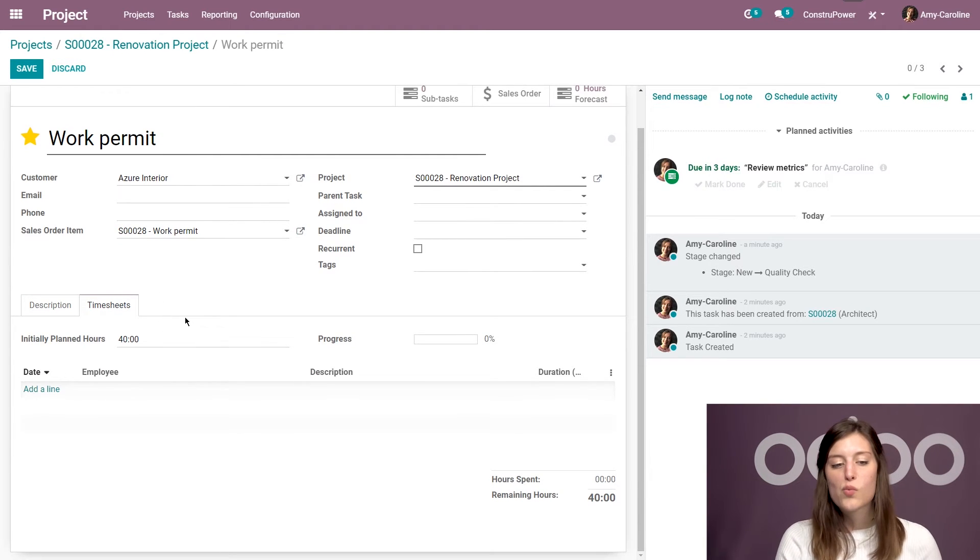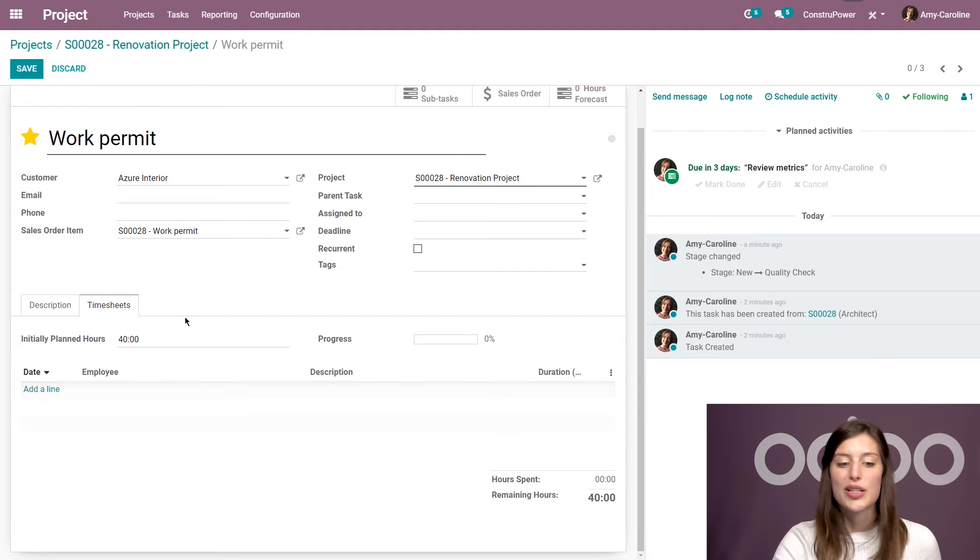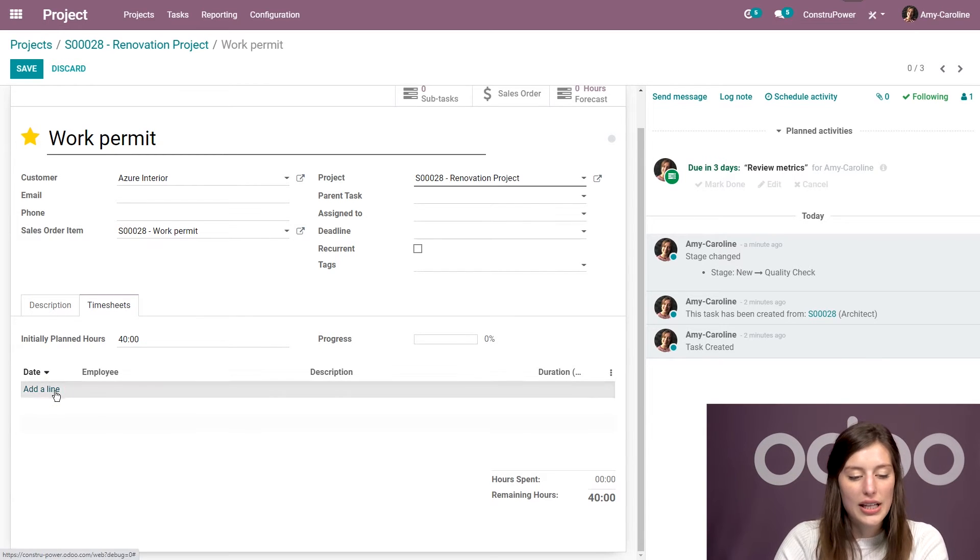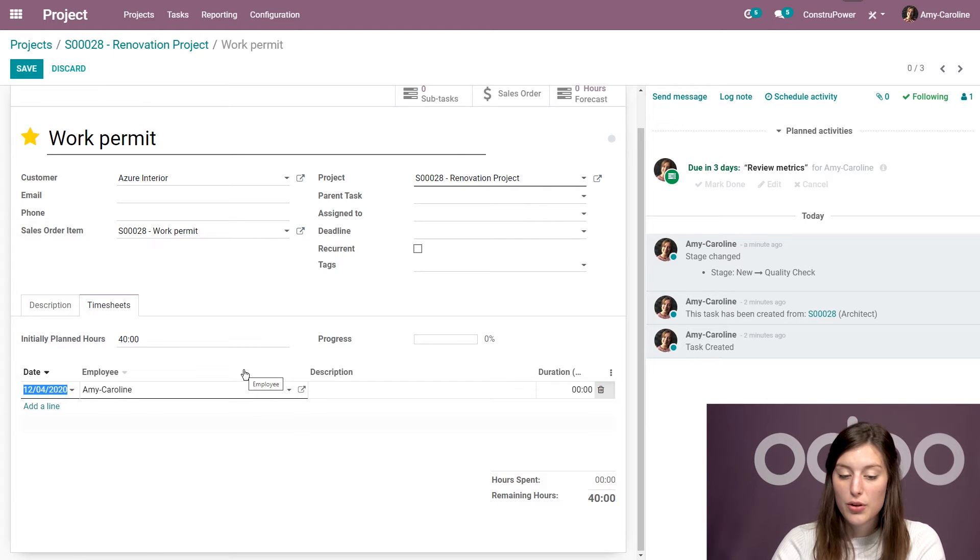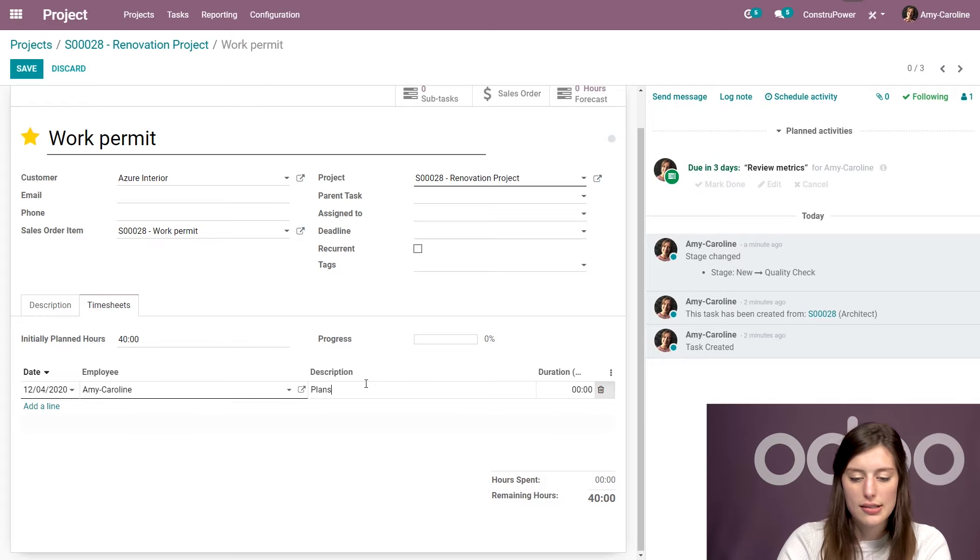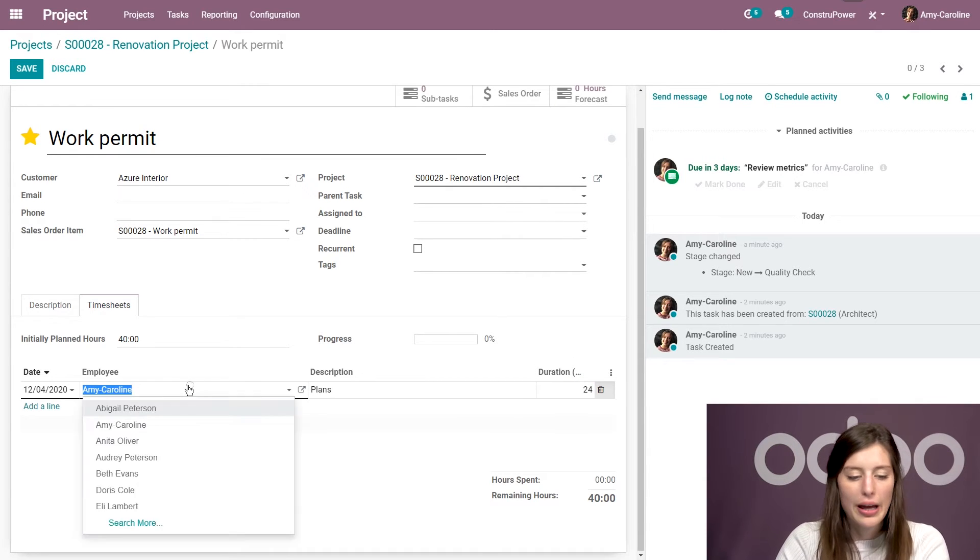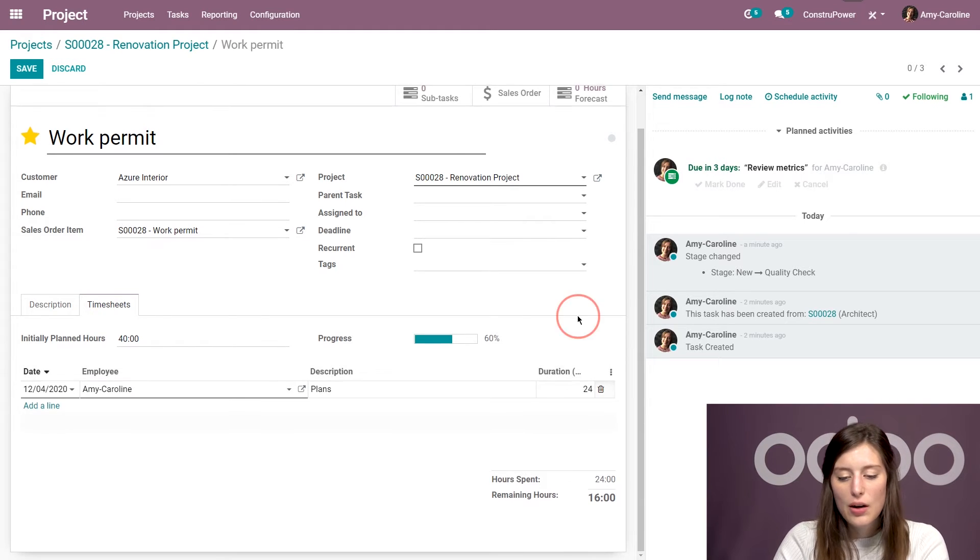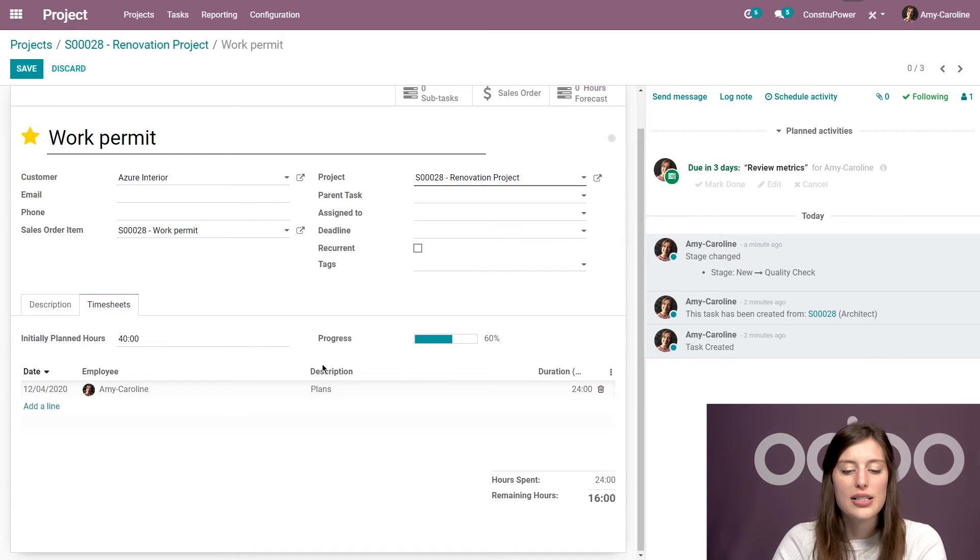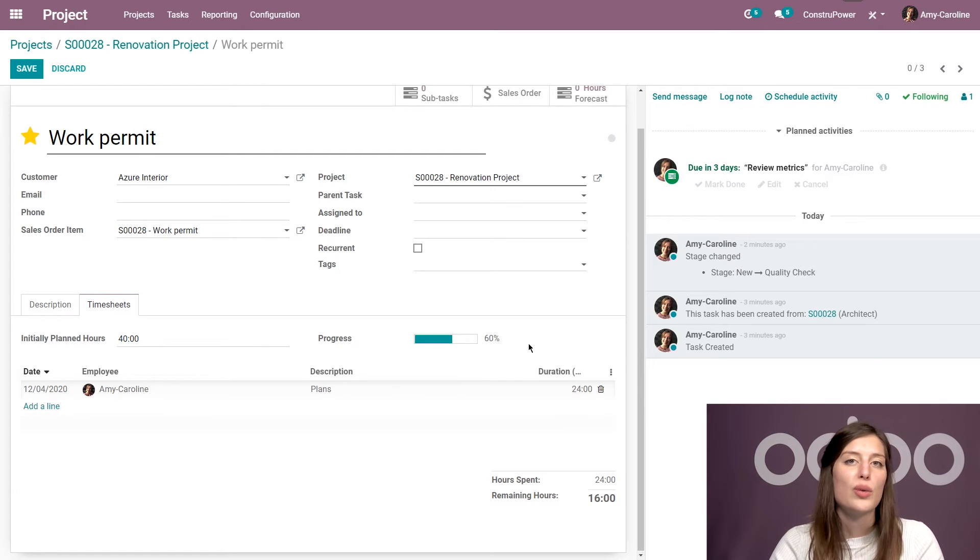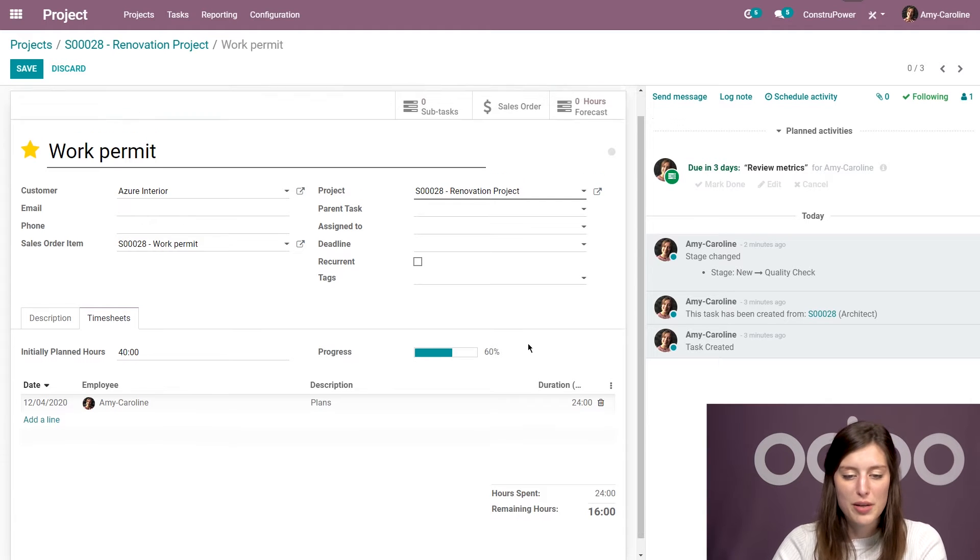And let's say when the workers actually start working, they're ready to register some timesheets. Let's say they are already ready and they can do that here manually on the task itself. So I can add a line. It's automatically going to be assigned to me since I'm creating this. But we're going to add a description. So here I'll say plans. And the duration is going to be 24 hours in this case. I can also change who it's assigned to if I would like to. But in this case, I'll keep it like that. Now I'll see that I have spent 24 hours on this task. 16 hours are remaining. And I have the progress based on our initially planned hours. So I know that, okay, I've already done a large portion of this task and I only have 16 hours remaining based on what we originally proposed to the customer. So I'm going to manage my time based on that information.